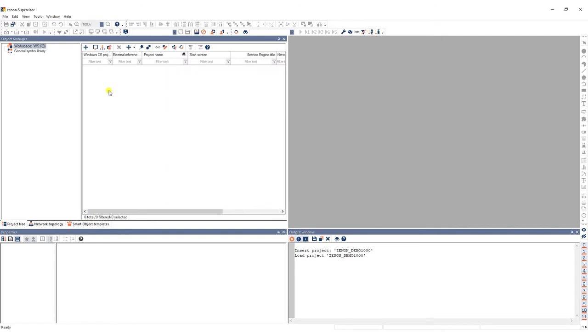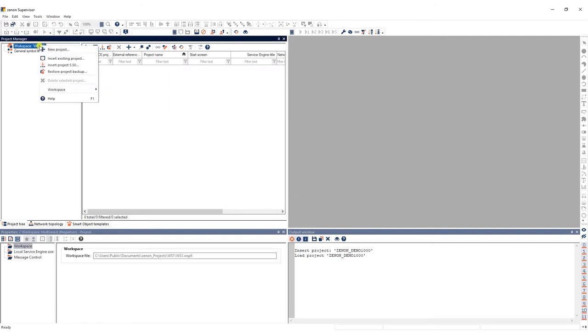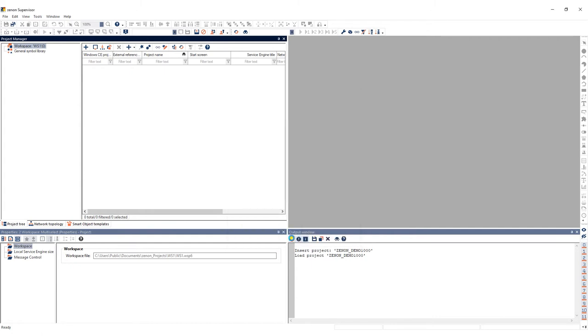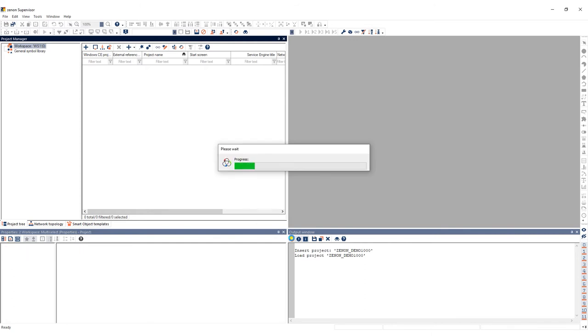We'll insert an existing project by right-clicking on the workspace and selecting Insert Existing Project. The Project Selection dialog then lists all the projects stored in the local database. We select My Project 1 and click OK. The project then gets loaded in the workspace.